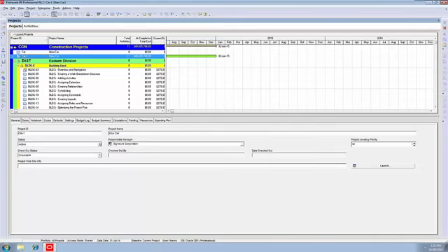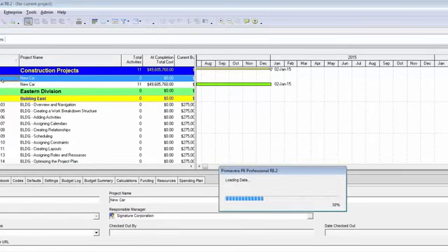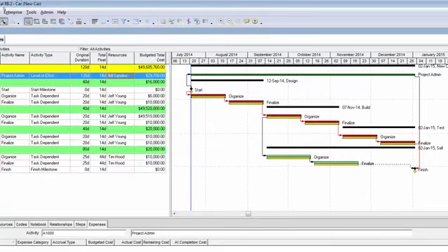Status is now active, and we can change from a status of active to what if. That means the resources in the copy will not be double counted whenever we do resource analysis in the future. Notice that a yellow question mark goes over the project folder to give us a visual indication that it is indeed what if. So we've got our copy and it's in the correct status. So we can now reopen our original. Let's see, in the header that the original has now opened.